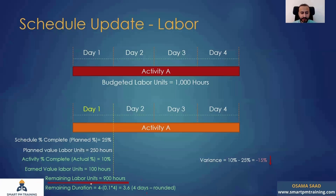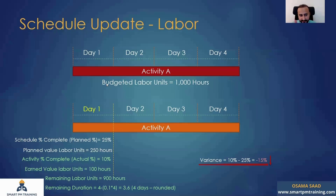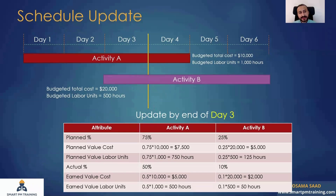Remaining labor units and remaining duration work the same way. The variance is still the same — 15% — because it's the same activity and same progress, just measured by two different parameters.